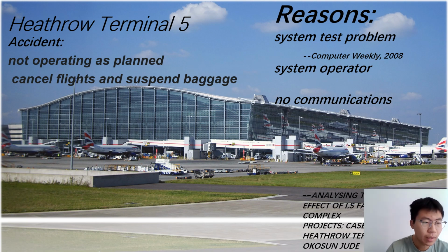For the third reason, it is seen that the project organization did not listen to many of the stakeholders, as this could have either stopped or postponed the failure experienced. There is so much evidence all over the news of staff complaining of not understanding the system, which were ignored and told everything will work out on that day. British Airways were warned by its own staff that the move to Terminal 5 would be a fiasco because they had not been given sufficient training.